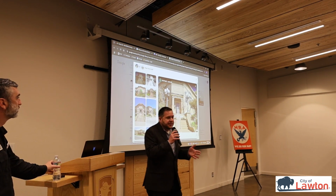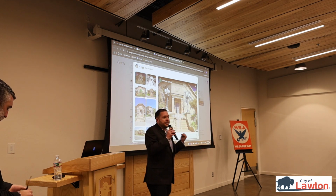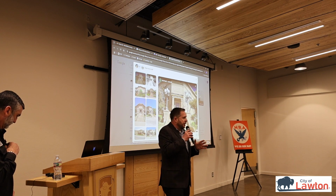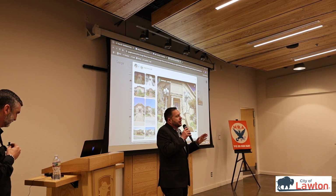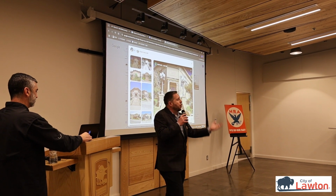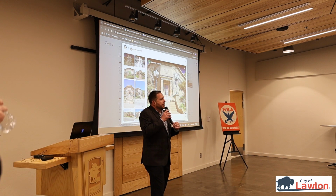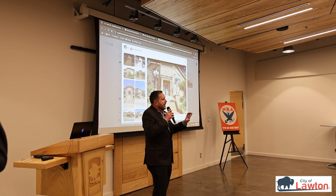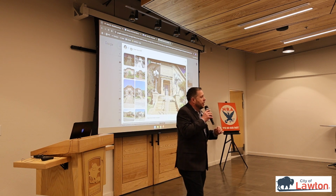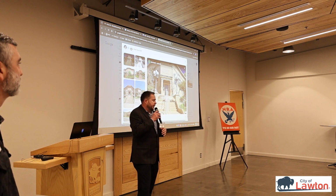Also, I would be completely remiss if I didn't include one step in that process, and that was that there were a lot of historical artifacts in that building. So we teamed with Jim Whiteley at the museum to go through and tag and number every artifact that we took out of that building, so it was identified what goes back in. When we were reopening the building, we revisited with Jim and looked at what items we can start putting back into that building that actually capture the history of it. So different pictures of the building, pictures of the librarians that were there, and of course the picture of Carnegie himself that is prominently displayed in every Carnegie library.